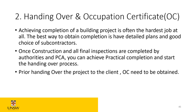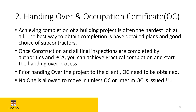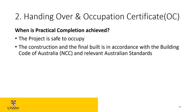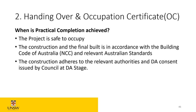Prior to handing over the project to the client, the OC needs to be obtained. No one is allowed to occupy or move in unless the occupation certificate — or an interim OC — is issued. When is practical completion achieved? When the project is safe to occupy and can be used; the construction and the final build is in accordance with the Building Code of Australia or NCC and relevant Australian standards; and the construction adheres to the relevant authorities and the DA consent issued by council. Everything has to tick all the boxes related to all the authorities and DA conditions.